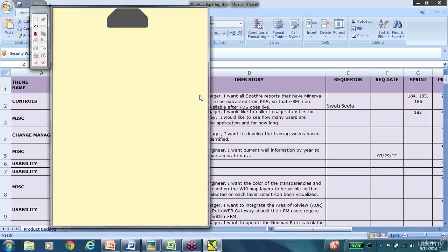All right. And also Agile, I still have Tina's question to answer. Is it tedious? Yes, it will keep getting incremented according to the expectations, and if the last added requirement is the one that needs to go first, that can be easily done. The maximum delay is probably you will have to wait until the current sprint is over, which will maybe be done in a month's time. That is why Agile is very, very strictly oriented towards what the business needs, not exactly on what documentation is created and all that. So mostly Agile projects, when they go for external audits, might not have the CMMI standards, or they might not have the Six Sigma standards again.